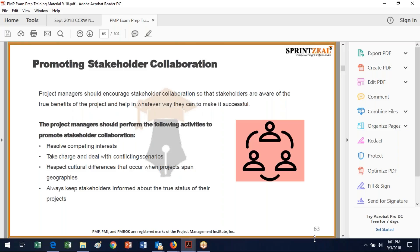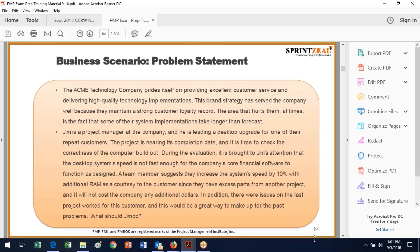The next thing you want to do is promote stakeholder collaboration. Encourage stakeholders to be part of the project, because costs get higher when you introduce requirements later or make design changes. The more you know at the beginning, the cheaper the project will be and the closer it will be to stakeholder requirements at the end. As a project manager, you need to resolve competing interests, take charge and deal with conflicting scenarios, respect cultural differences, and always keep stakeholders informed about the true status. You don't want to say everything is fine, fine, fine, and then fall off a cliff.